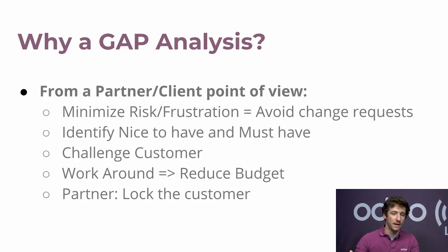These are called change requests, when the client could say, oh, look, we didn't discuss this, and I want to add this to our program. But if you made a gap analysis before and listed down everything they asked, you could say to your client, look, this is what you asked for, and what you're asking me now is something additional. So you could more easily explain to your client that this is something that is going to be added to the program. It will represent more cost and of course more time to be implemented. Avoid taking risks by doing a gap analysis. This is the first reason why you should do one.